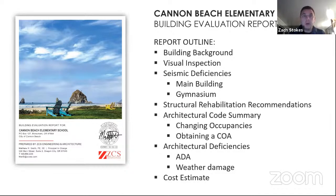They're very, very rough. We have not done design. We have not prepared construction documents. So we're really going off of our knowledge of what a seismic retrofit costs, what typical remodel costs are, working with O'Brien and talking about cost per square foot, so that we can help give you an idea of different levels of effort associated with bringing this building back online, or just maintaining it the way it is.